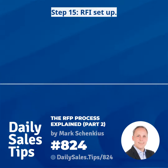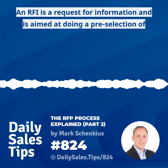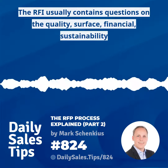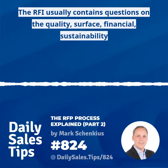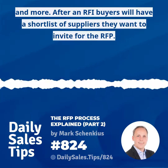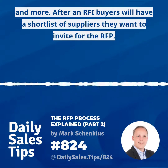Step 15. RFI setup. An RFI is a request for information and is aimed at doing a pre-selection of suppliers prior to inviting them for the RFP. The RFI usually contains questions on quality, service, financial, sustainability, and more. After an RFI, buyers will have a short list of suppliers they want to invite for the RFP.